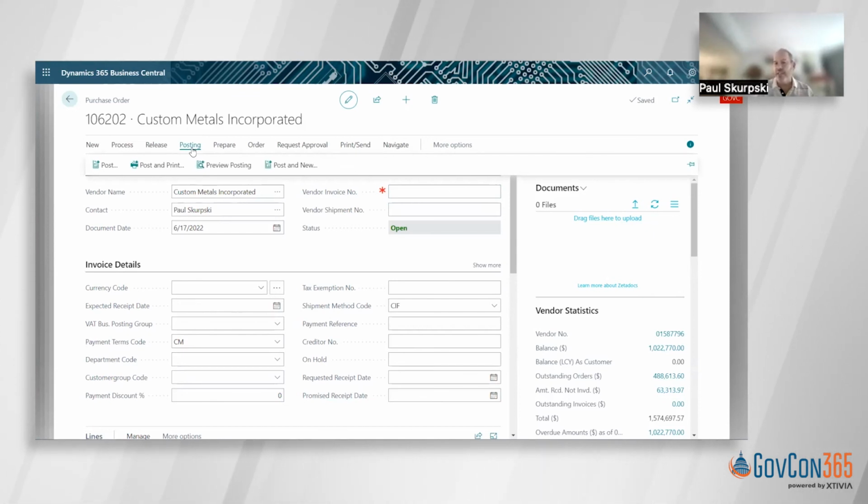So that's the process we take you through, from generating that requisition through the sourcing, and you could see how we could get those 3 quotes. Then we turn it into a PO document. And you can see we're never rekeying any of the data. We would also see that commitment against the project where we requested that particular purchase against. So you're going to get that visibility right away on that particular commitment, and no rekeying of data as we go through.